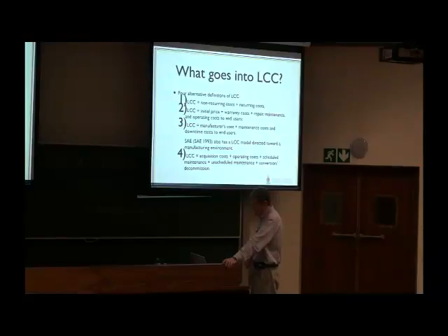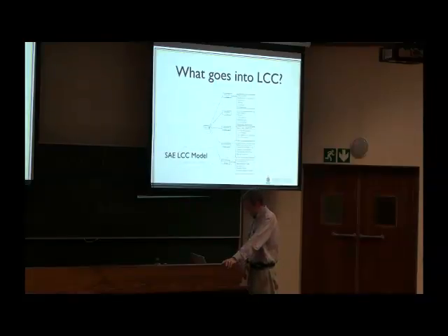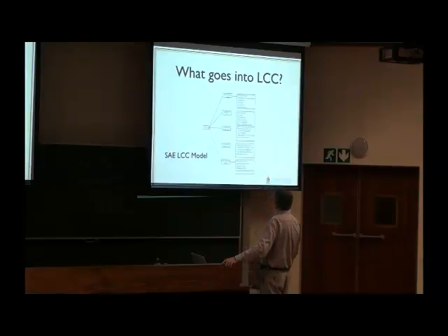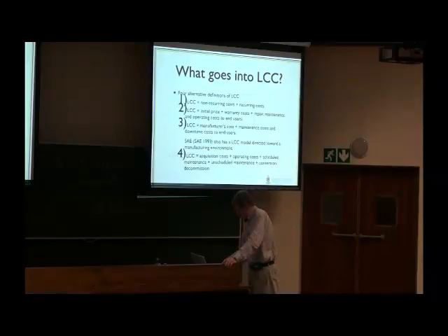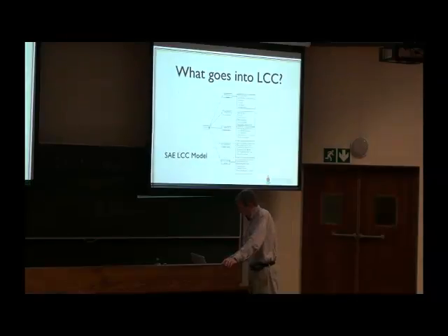SAE also has a life cycle cost model directed towards a manufacturing environment. Life cycle cost equals acquisition costs plus operating costs plus scheduled maintenance plus unscheduled maintenance plus conversion and decommissioning. And that is then the SAE life cycle cost model. So there you have acquisition cost, operating cost, scheduled maintenance cost, unscheduled maintenance cost, and conversion and decommissioning cost.